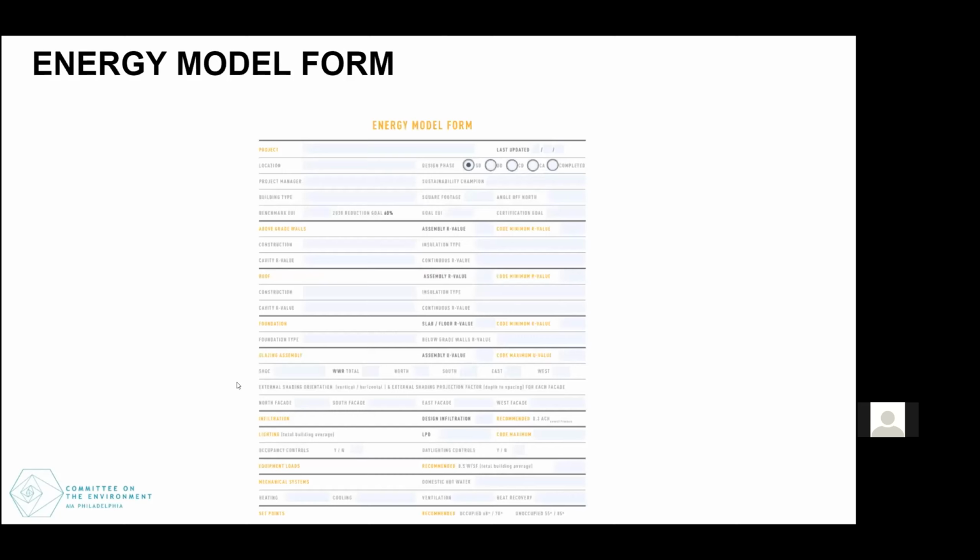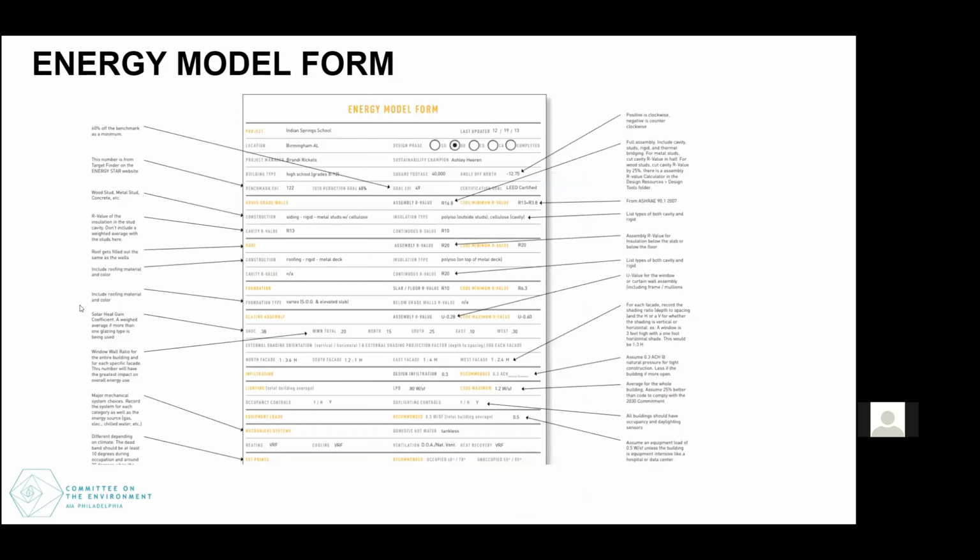This is another tool that we put together. It's an energy modeling form. This form is shared between Lake Plato and the MEP consultant to ensure that the energy model inputs match what was designed. So just a common document that we're using to establish expectations and common design values. And we have this version posted on our intranet site that explains each field so that we can all understand the inputs that are used to model energy performance.